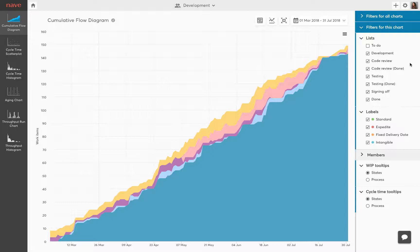There are three basic flow metrics we focus on. Cycle time, which measures the time between starting and finishing work on a given task. Throughput, which is the number of tasks delivered on a certain day, week or month. And work in progress or the amount of tasks available in each process state.